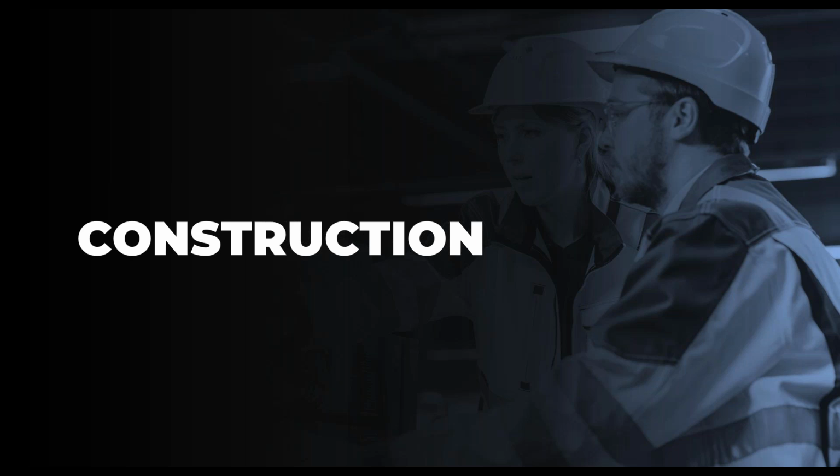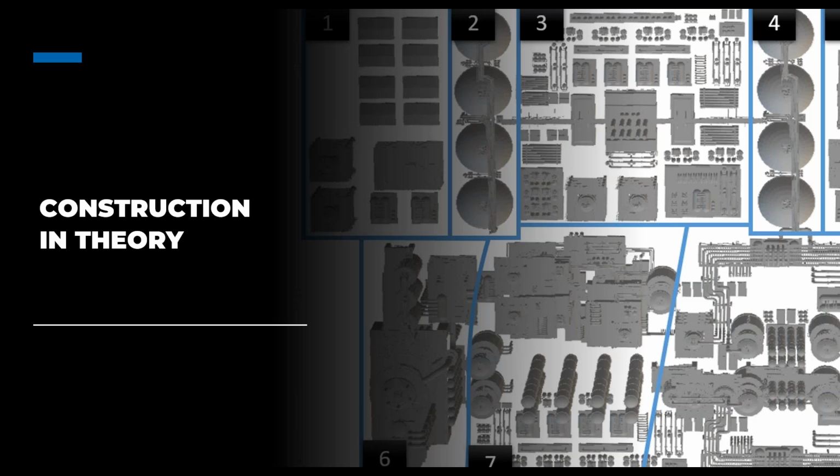All right, so moving on to construction. Joe talked a little bit about the path of construction earlier. We talked about aligning the path of engineering and the path of construction and the challenges that can create, right? If we don't have good planning development early in the project, if that resource loading of the schedule isn't complete, if we're not staffing up early enough to support engineering and procurement activities, the path of construction can become a little bit complicated, right? If we are running into things that are impacting that in a negative way.